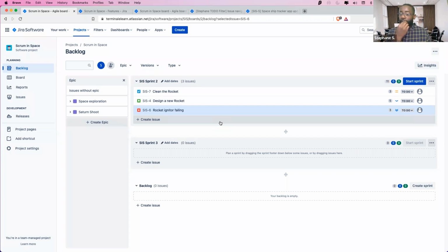So in Scrum, in Jira specifically, we use the story points. Now, what we define typically in companies is the assumption that every developer has approximately 8 story points that he can accomplish during a sprint. That's typically the standard. Companies are using 10, some are using 8, some are using 6. It depends, but the sweet spot is 8.